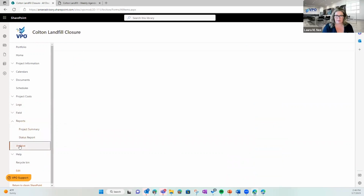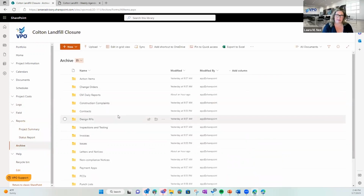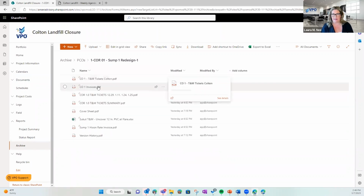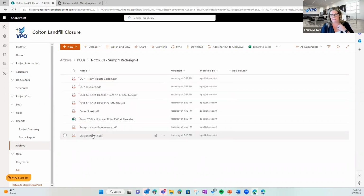And then I thought I would just wrap up talking about archive. As a CM, oftentimes our customers who are CM construction managers are required to turn documents over at the end of the project. So what this does is it essentially tracks all of the information as it's being submitted on a regular basis in one location. So if you wanted to see all the PCOs that have been entered to date and all the data behind it, you can see all of the attachments, the cover sheet, and the version history.